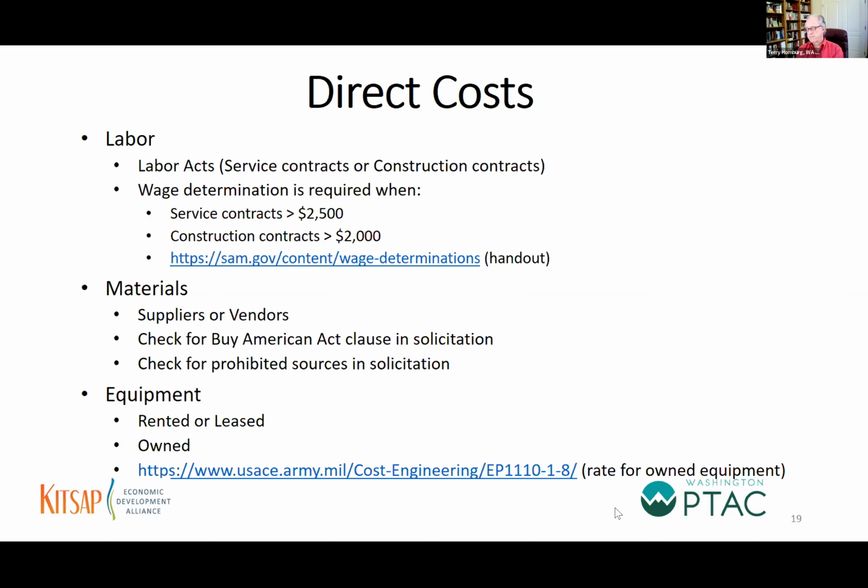For example, in the Department of Defense, they have a clause, or more than one clause, that says if you are providing tungsten, for example, or steel, or any list of materials, cobalt, there are restrictions on countries that you cannot purchase it from. So you want to be mindful of that.